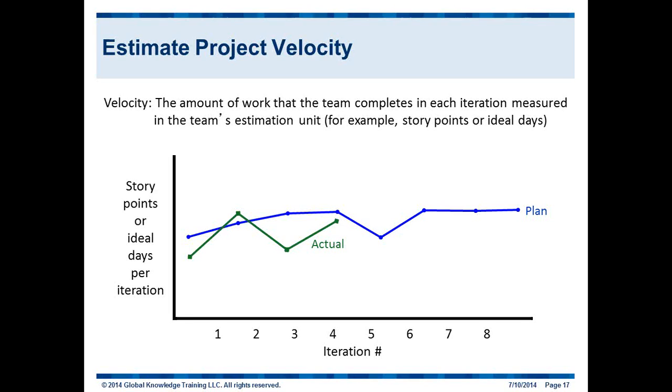A quick note about velocity. I want to be really clear that velocity is not about the team performance. It's loosely tied to the team performance for sure, but there are many different things that are going to affect velocity. Sometimes, for reasons beyond our control, stories get blocked. They can't be completed. Has nothing to do with the team's performance. I was working with a team and our environments kept going down. Had nothing to do with the team's performance. People take vacation, especially this time of year. Has nothing to do with the team performance.